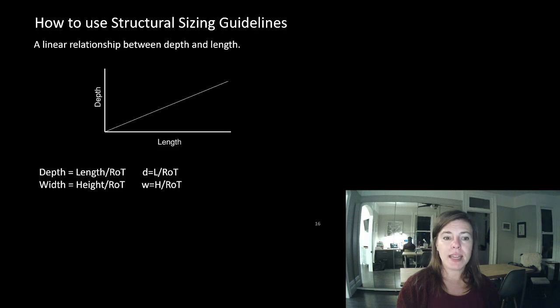Well, maybe all of a sudden now you don't have enough headroom on each story, which means you have to delete a whole story of your project. For an owner, knowing how many floors they have means how much revenue they have coming in, which means now all of a sudden the building is not feasible. It's just not economically feasible for the owner to build it. So these are really important things within the decision-making process.